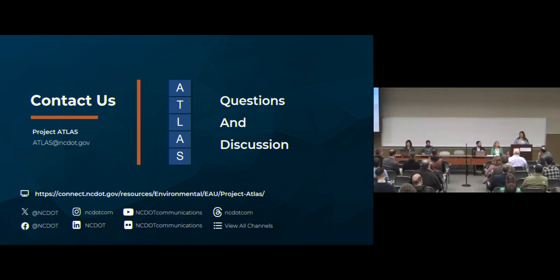Only the latest will show up on your workbench. Only the latest will show up in your Power BI. Your old one will be archived automatically in SharePoint, so you don't lose it. You can go into SharePoint, hit the 3 little buttons, go down to the history, and see all the archived ones. But always the latest one will be the link in the Power BI dashboard.